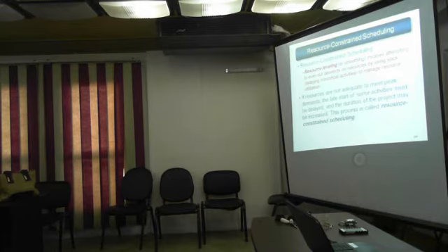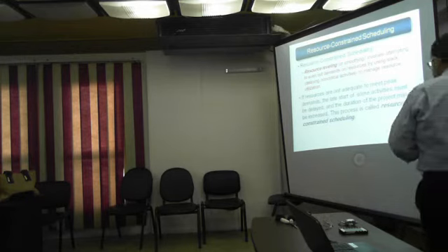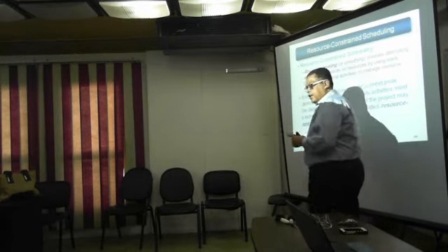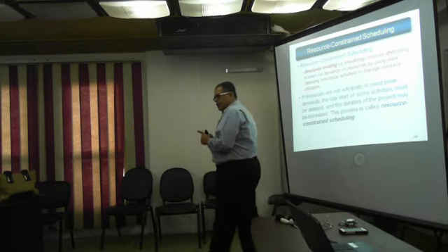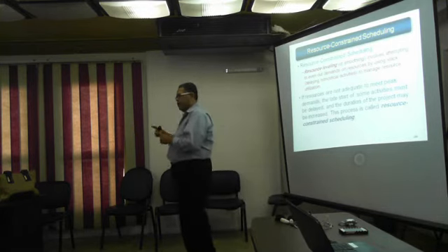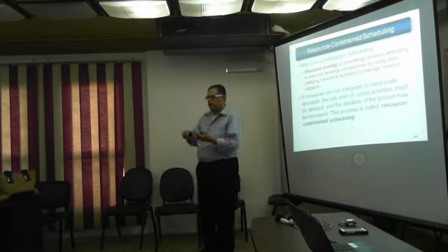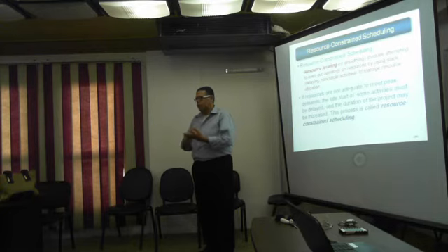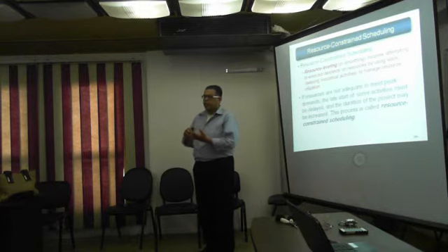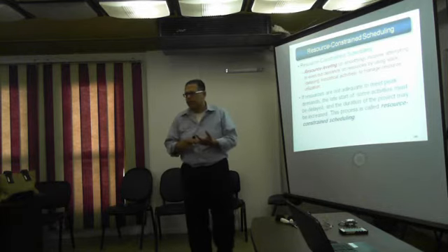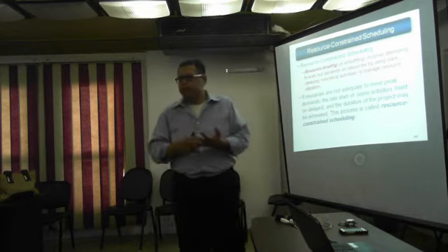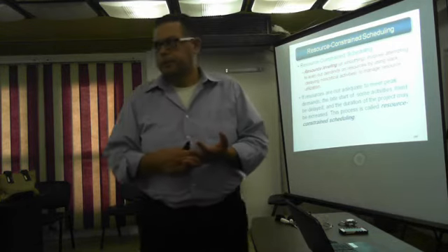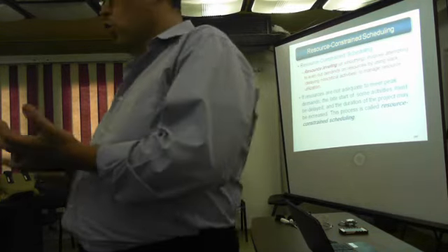First of all, am I going to stick to the deadline of the project? Then, in this case, if you remember the triangle of the project, we have the cost, we have the performance, we have the time. If we are going to constrain the time, then we have to increase the cost in order to have the same performance. Increase the cost means increasing the resources. Okay?